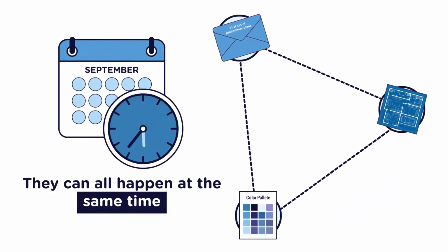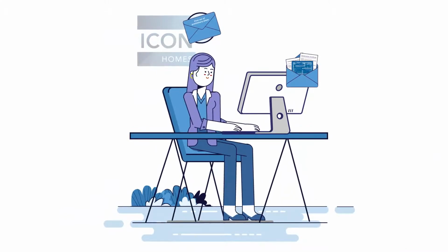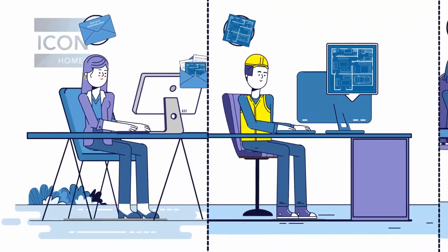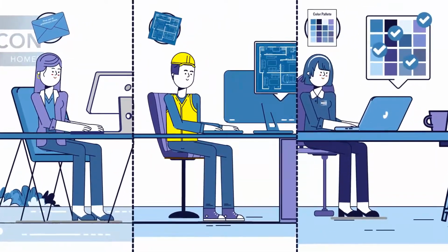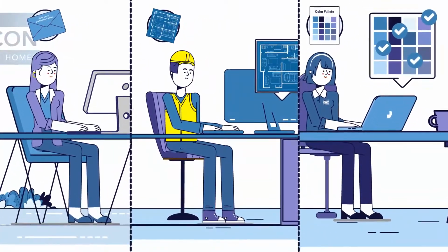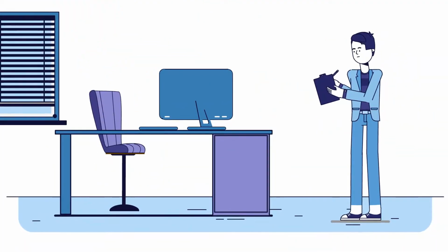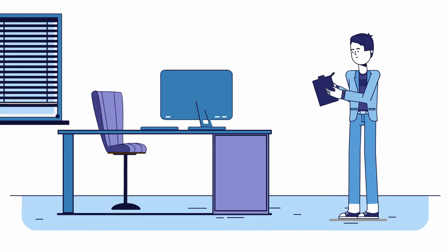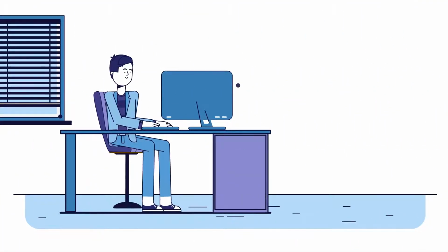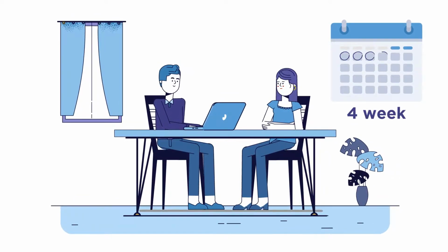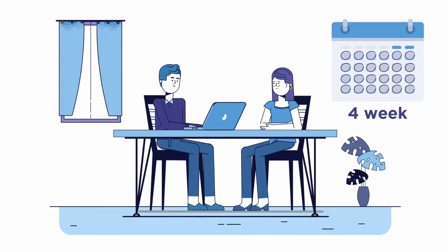During this part of the process, the town planner is preparing their report. The hydraulic engineer is working on their drawings, and you will be working closely with your colour consultant to select the colours for the exterior of your home. It will all come together at the end, and we will be ready for our designer to do one final check before we submit the DA application to council. It will take approximately 4 weeks to have all our documents finalised for submission.